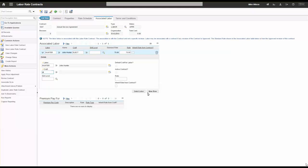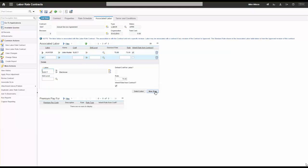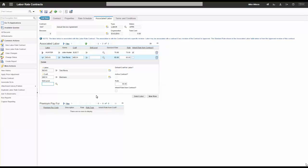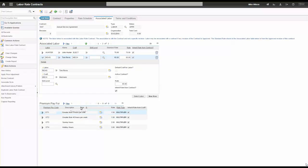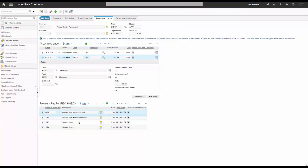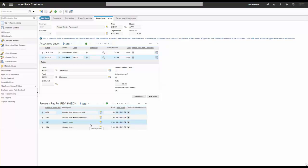I'm going to add John Hunter as an electrician and Tom Revis as a mechanic. Once I identify these people, because they were previously in the system, it establishes their premium pay rates — for example, if this person's working more than eight hours per shift it's time and a half, working on Sundays it's two times, holiday hours three times. So we can track a lot of information on the particular contract.